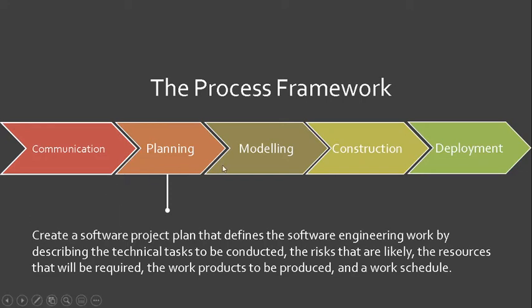Normally, when we say planning activity, it should follow after communication. The planning activity is where the team creates a software project plan that defines the software engineering work by describing the technical tasks to be conducted, the risks that are likely, the resources that will be required, the work products — basically the software or system to be produced — and also the working schedule. This includes release planning and iteration planning for extreme programming, and sprint planning in Scrum — these activities fall under the planning activity.